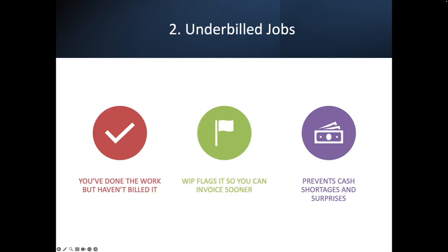What about the opposite side of things though? What if we're looking at underbilled jobs? This one's a little more sneaky. Underbilling means that you've done the work, but you haven't billed for it yet. So if this keeps happening, you're basically floating your client. You've become their bank. You've spent the money, but you haven't brought it back in.